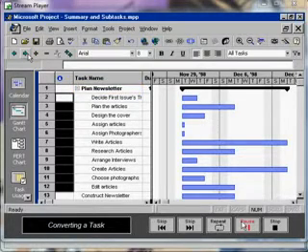If we look at the Gantt bar chart, we can see that a summary task is represented by a black bar extending across the duration of its subtask. If we decide a subtask should be a main phase task and not a detail task, we can change it into a summary task by highlighting and clicking the Outdent button.